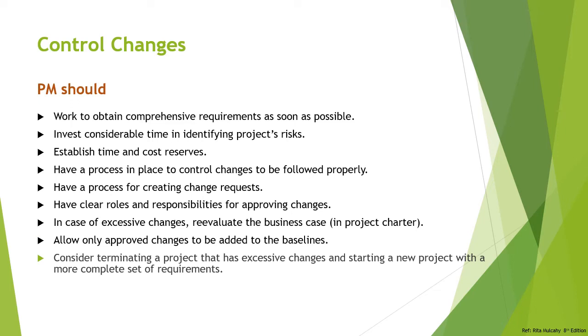Very important point. Consider terminating a project that has excessive changes and start a new project with a more complete set of requirements. So it means if you are getting a lot of changes every day, it means there is something seriously wrong in the set of requirements that you've gathered from the stakeholders.